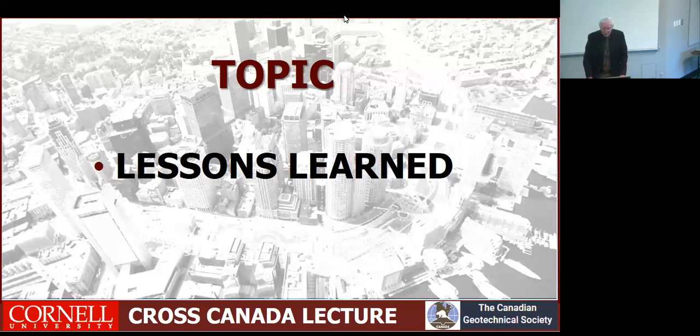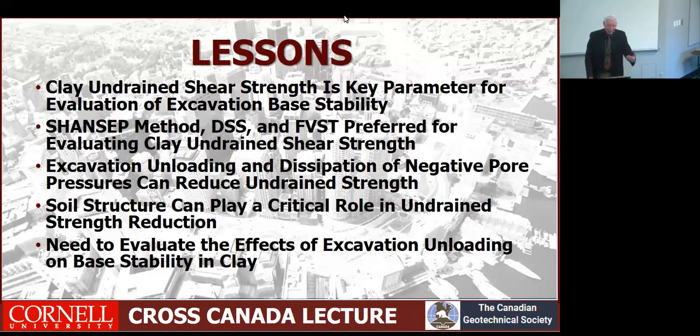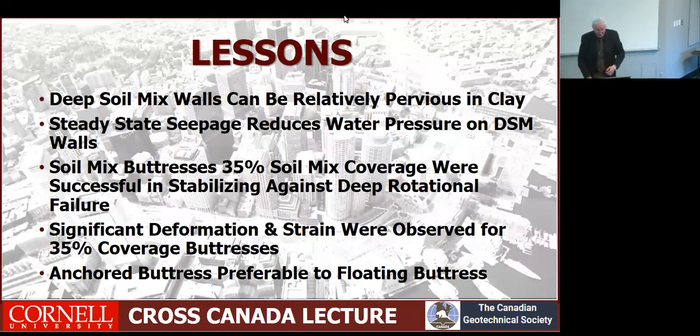So, last part of the lecture, lessons learned. I'm going to go through these relatively quickly in order to save time. This undrained shear strength is a key parameter. And as we've seen, the soil structure can play a critical role in the undrained strength reduction, and you need to evaluate the effects of excavation unloading on the base stability in clay. If you don't have a structure that's going to dissipate negative pore water pressures, then you can probably assume that the S sub U is okay based on our conventional design methods, but you need to think about it.